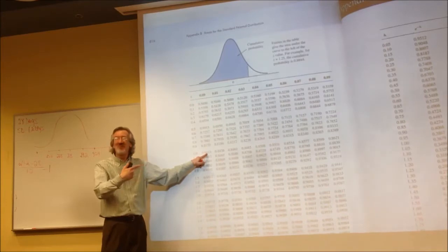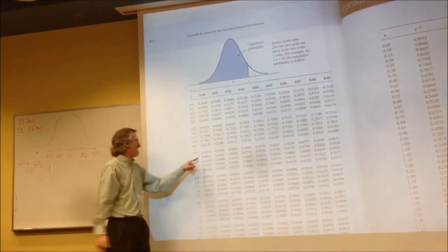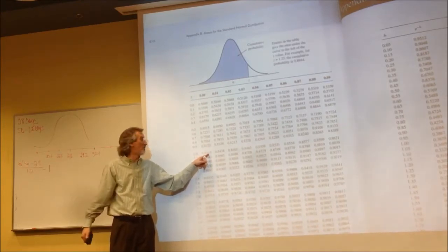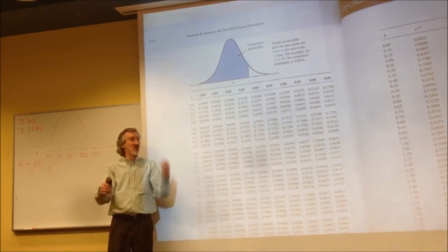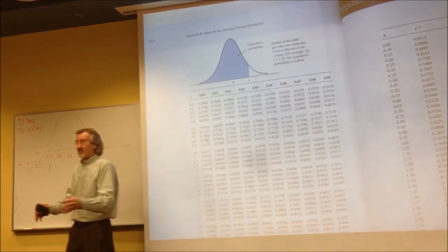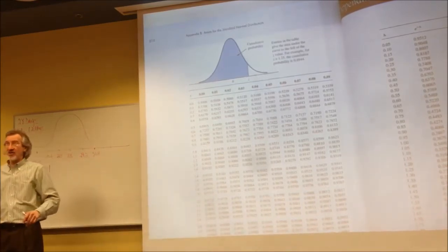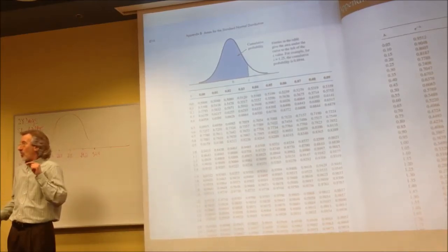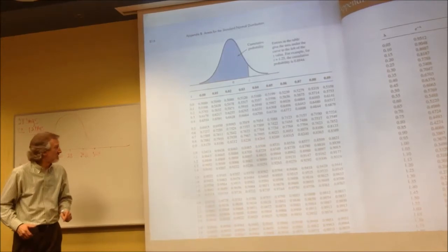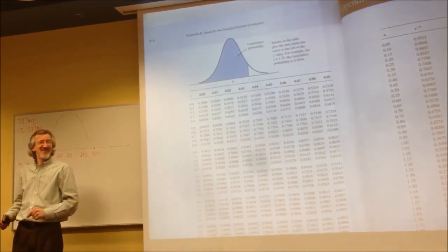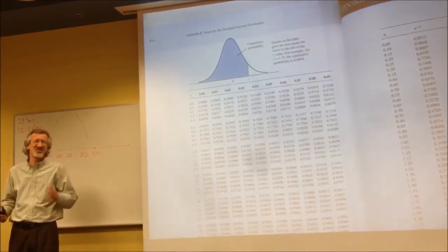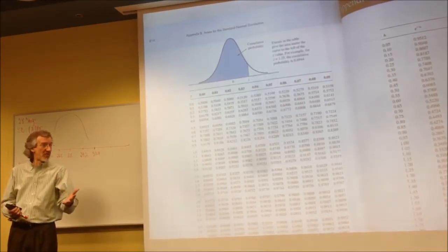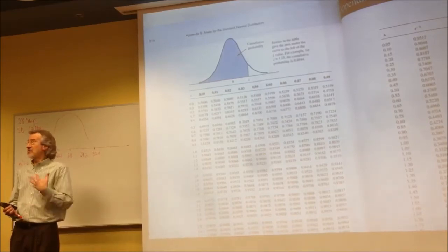84% chance. So what's the probability it will take longer than 29.2 days? The opposite is a little over 15% chance. So you're a manager. You are in charge of cash control. If you run out of cash, it's coming down on you. You've got a 15.67% chance that you're going to run out of cash. Do you feel comfortable with that? And I don't know if I do.